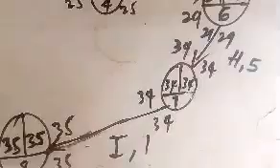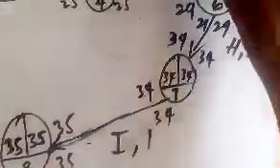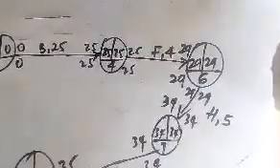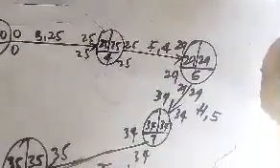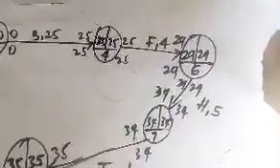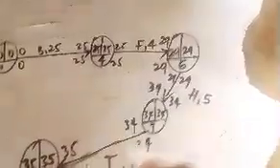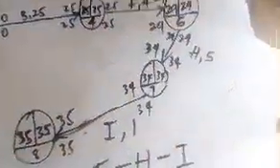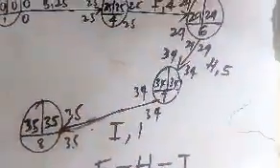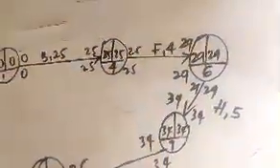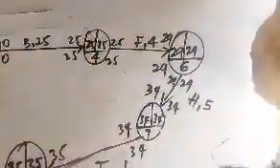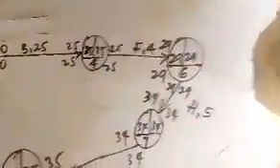So therefore, my critical path is, what do I have? You can complete that, right? B, F, H, I. That's my critical path. When we get to class, I'll explain how we're going to get that critical path without even drawing much like that.